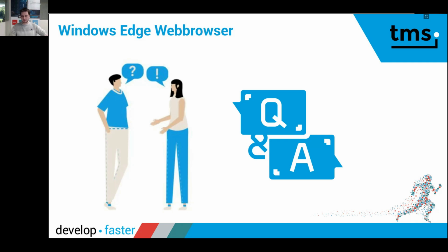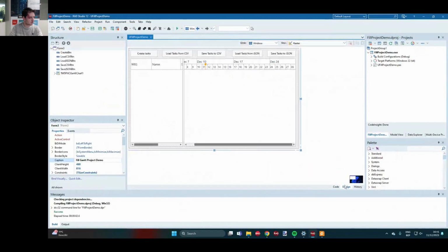can you lock a task bar on a date? Well, you are able. The locked property was added so that the task date, start and duration can't be changed and will stay the same. So it is possible to lock them. So you can lock the task. Let me show you here.